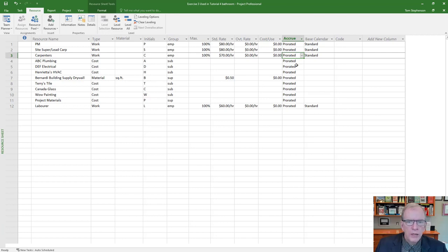If you are looking at a subcontractor, likely you're not going to pay them till the end of what work they're assigned to. So you can think about this in a lot of ways because you would pay, say they were working on an activity and you assign them to that activity and the activity is say 15 days long. Well, maybe you know you're not going to pay them any money till the end of that 15 days till they've done something.